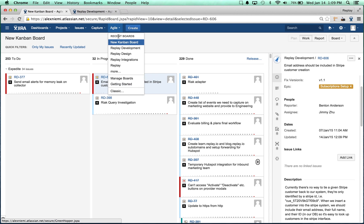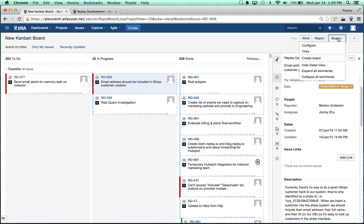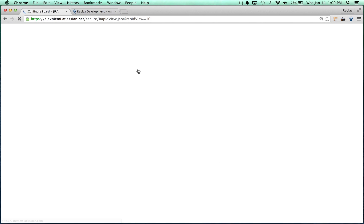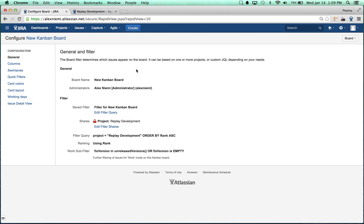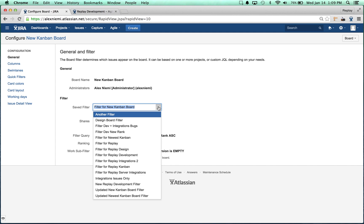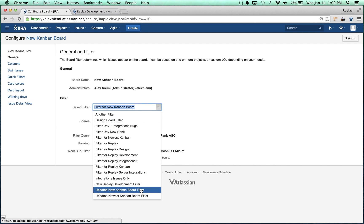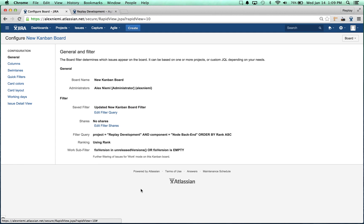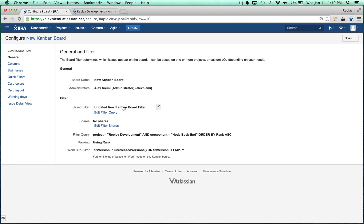Once again, if we go to board configure, now instead of clicking on edit filter query we just want to click on this edit menu. It's kind of deceiving, not a great UI/UX here, but we can select which one we want and it was the Updated New Kanban Board Filter. Now the tasks that are shown on this board are going to reflect the fact that they must have that component equal to node or backend attached to them.